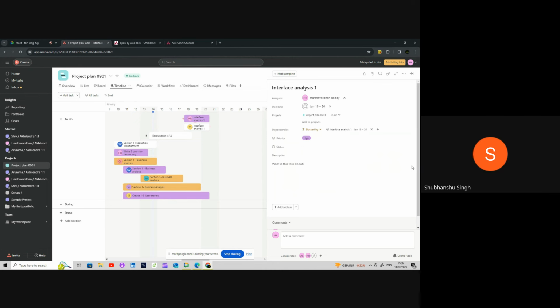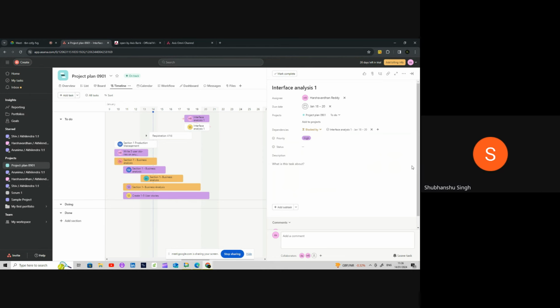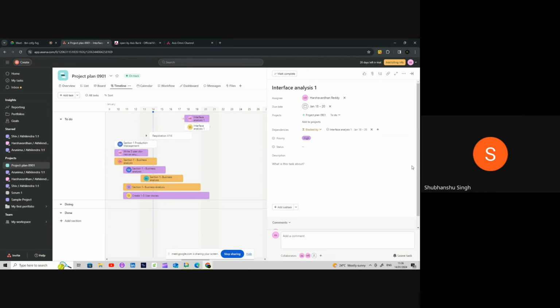So then you work, for example, there's a very common practice that you will work with the training department. There's a separate training department in at least most of the major large corporations. So you will work with them, update the training manual. When the product is initially launched, you will train the users on how to use this particular application. So impact analysis is identifying the process, system, and people who are going to be impacted by your project, and how you handle that impact. And like it is what we are doing right now, how it is impacting in the future. Exactly.